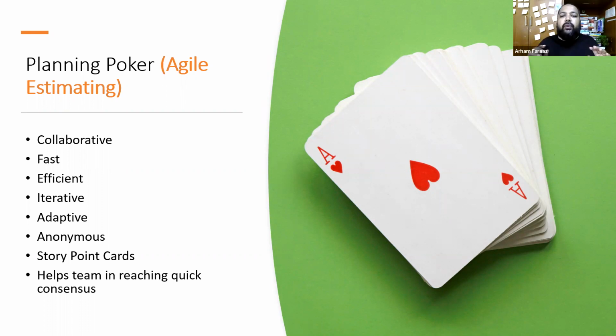So in planning poker, we give cards of the story points to all 4 developers, and then we describe the story. Once we describe the story, we tell people to put the card, whatever is their estimate, upside down, keeping the numbers below. The story point numbers will be in the Fibonacci series format: 1, 2, 3, 5, 8, and 13. 13 we won't take much because it goes to the next sprint also. We want to keep the work as much as possible in the sprint, right?